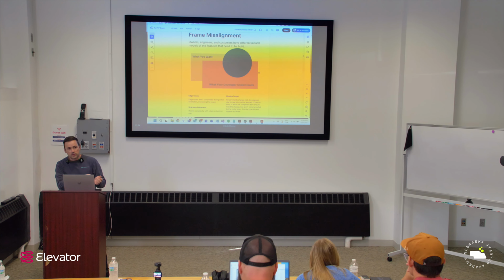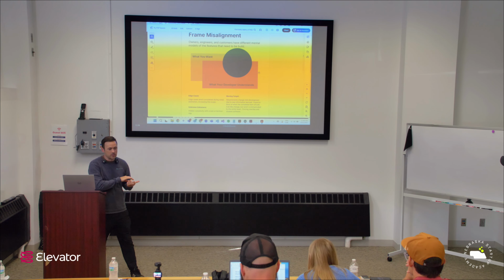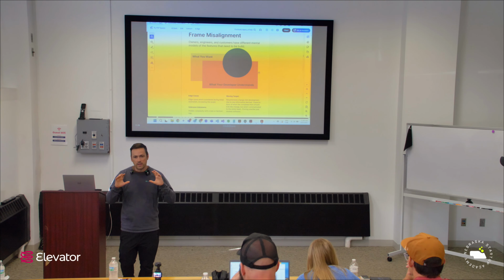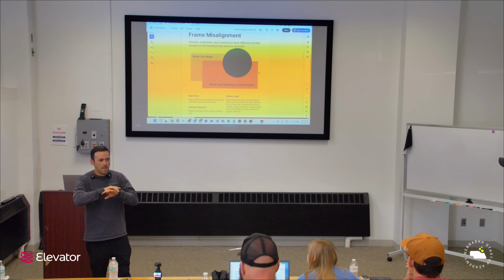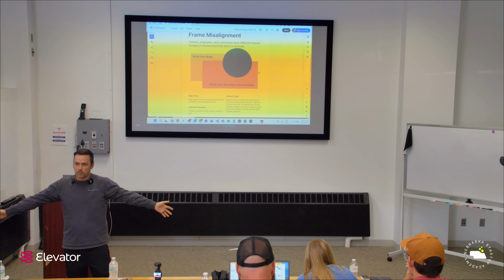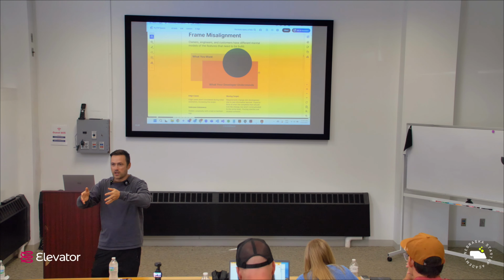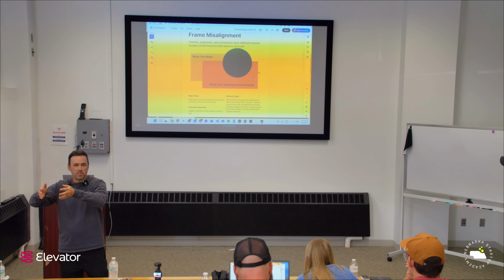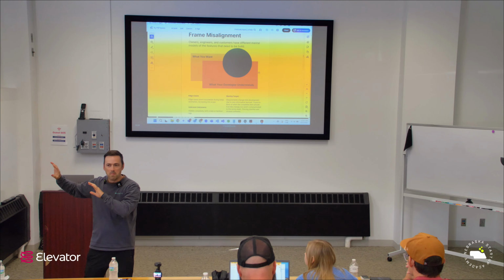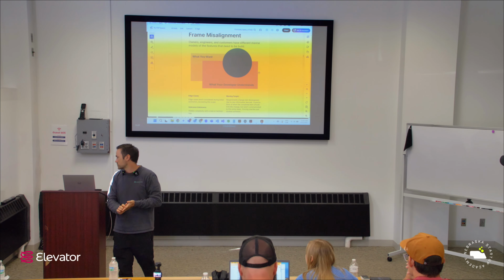And then software is always a moving target as well. A lot of people like to go in, take a Figma or an Adobe Illustrator, and spend months and months building out these beautiful mock-ups of what the entire software should look like. And then they get to building the feature and they run it across the customer, and the customer is like, that's great, but what I really want is this. And then they've voided that entire month of work, because now they've got to go in a completely different direction.